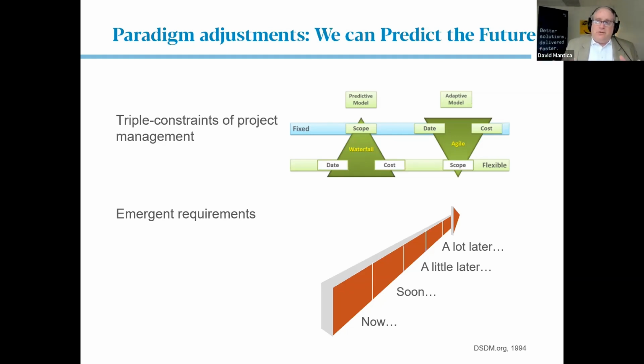That Agile, when done appropriately, or adaptive when done appropriately, allows you different points of time to re-predict the future, to re-gauge the future. An example of this is at ASPE, the company I was talking about before. We had a budget, a year budget, and inside that year budget was some high-level plans, but I planned in quarterly increments. The actions, the marketing actions, some of the sales actions, some of the partnering actions that would occur so that I could better protect myself from shortening the cycle of bad decisions.